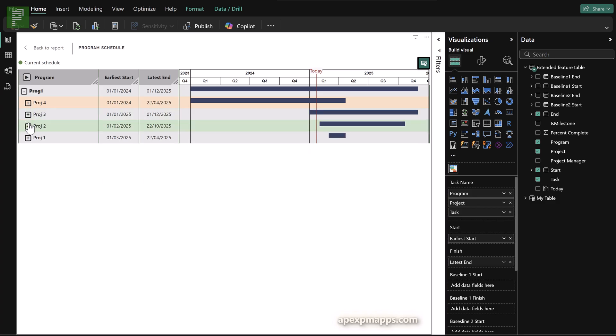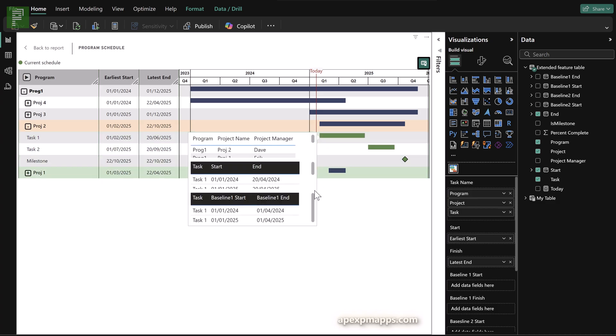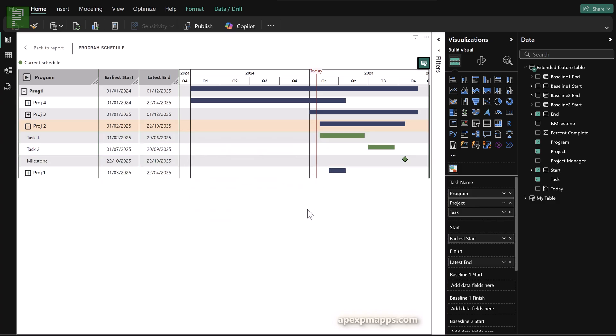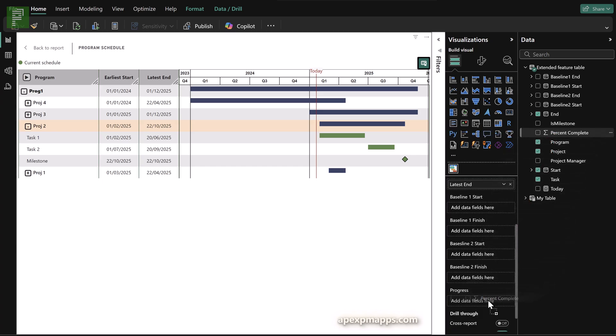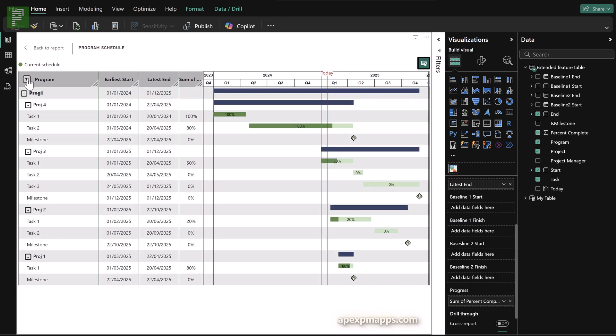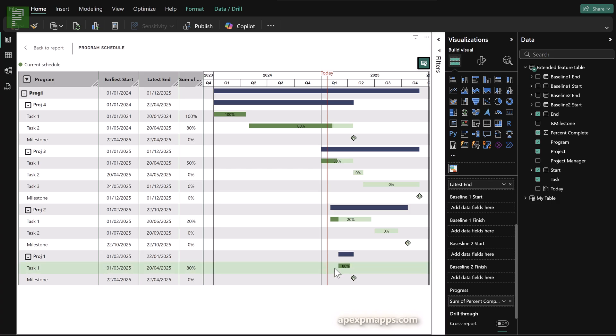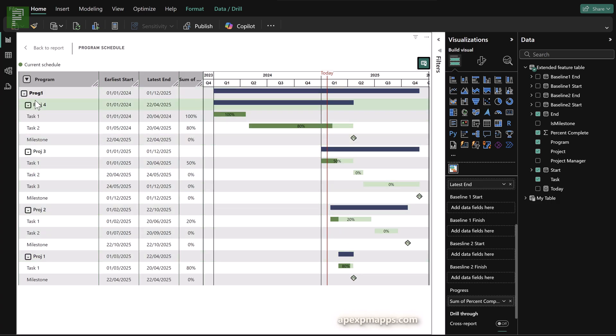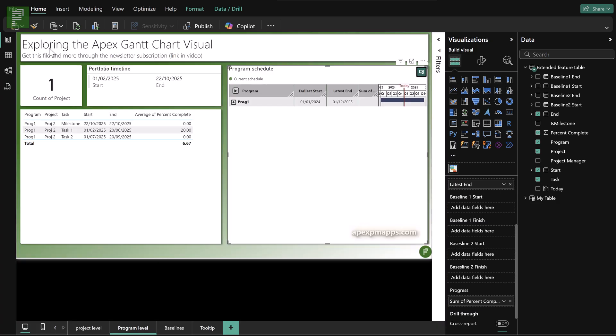So for now, we already only added the program project and task layer. There's more that we can do with this visual. We can start adding more data to the system, such as the percent complete, which is a very important thing when you're talking about projects. And if I open that up again with that little triangle, you'll see that there is a darker line until the progress. And there is even a visualization of the percentage of the progress that we're making. So there's even a project that's ahead of time, which is excellent.